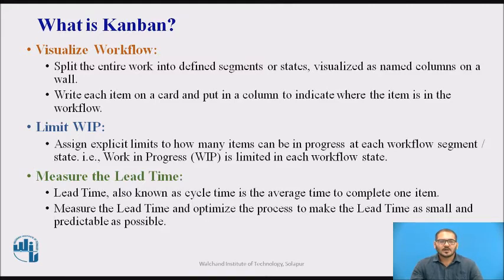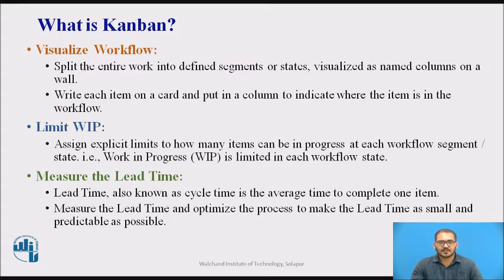Limit work in progress: it assigns explicit limits to how many items can be in progress at each workflow segment or state. That is, work in progress is limited in each workflow state.